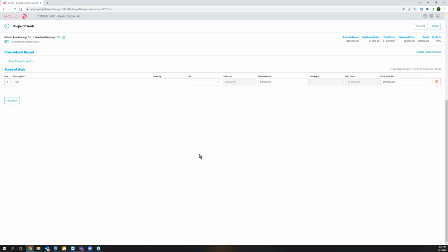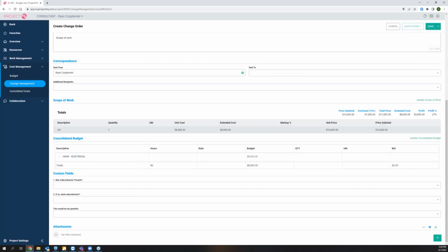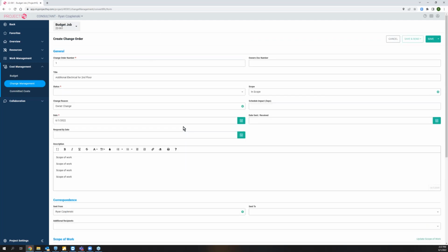All right. So I just wanted to show here how this all copies over. So we're now in a change order. We've copied our now approved RFC into a change order. At this point, it's already approved. We could just go push it to foundation. As long as there's not any other changes that are going to have to happen here, we want to make sure that we go through all the motions of getting it priced up and getting it approved and making revisions. We're doing all of that in the RFC. By the time we're converting this to a change order, we're just going to push it to foundation. We have a done, ready, approved change order.